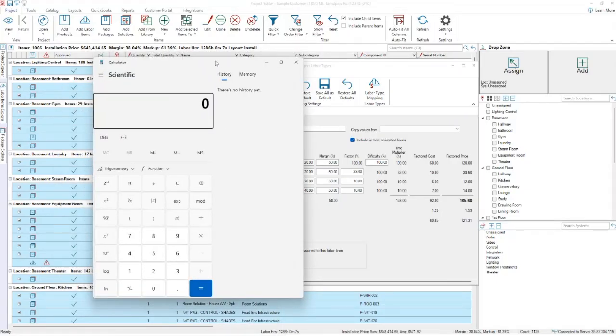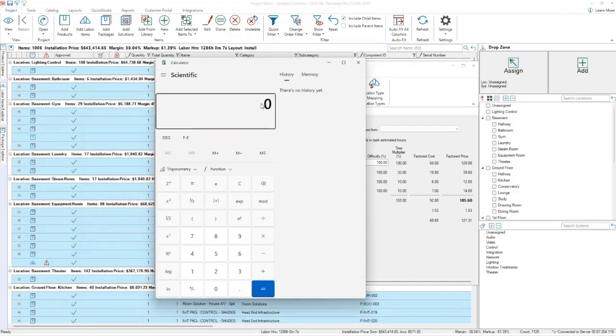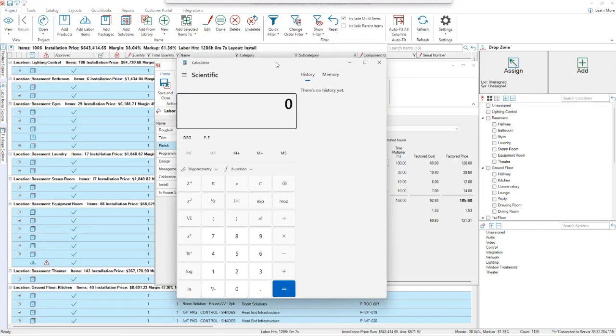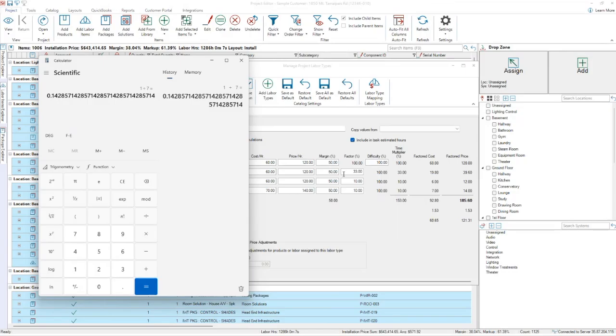If you told me that you schedule 8 hours a day and that it's 7 hours of efficiency, then there's just a simple calculation, which is 1 hour of non-production time divided by 7 hours, right? If I add those two numbers together, that gives me my 8 hours, and 1 divided by 7 is about 14%. So I would put that number here in place of the 33.